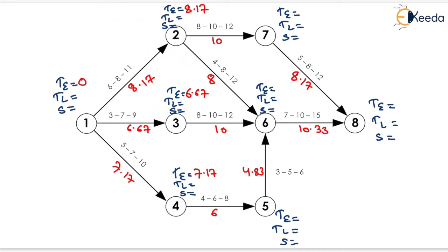For event 5 it will be equals to 7.17 plus 6, which equals 13.17. Similarly for event 6 it will be equals to 8.17 plus 8, that is 16.17; also 6.67 plus 10 that is 16.67; and 13.17 plus 4.83 which equals 18. The maximum value is 18, so that is the TE for event 6. For event 7 it will be equals to 8.17 plus 10, that is 18.17. For event 8 it will be equals to 18 plus 10.33, that is 28.33; also 18.17 plus 8.17 equals 24.34 — so the maximum value 28.33 is the TE for event 8.